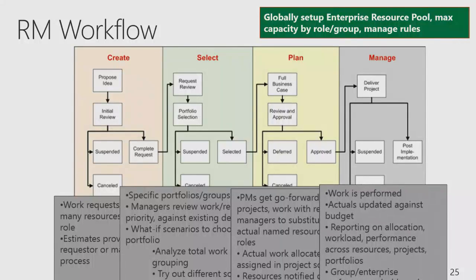So you're getting actuals in. And a really big part of that is not only actuals, but remaining work. I assigned you 40 hours. You've done 20. You need 30 more. I need to know that as a project manager so I can manage that delta and manage my project to successful completion. So capturing actuals and getting people in the habit and the culture of giving you back how much remaining work there is, it's really a cultural shift for a lot of folks.